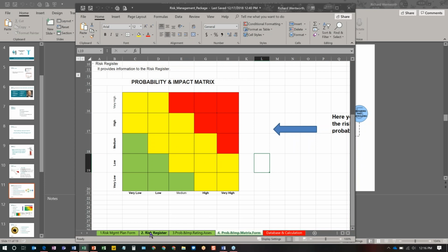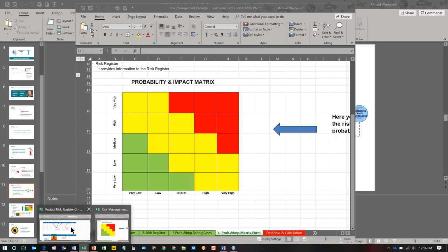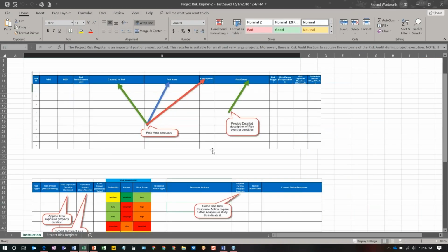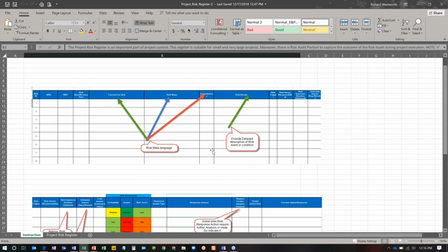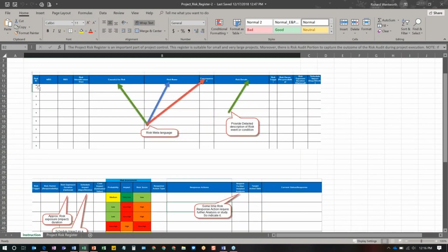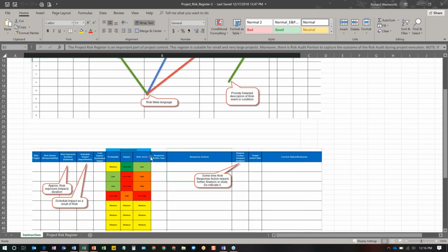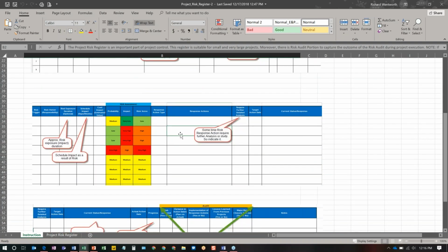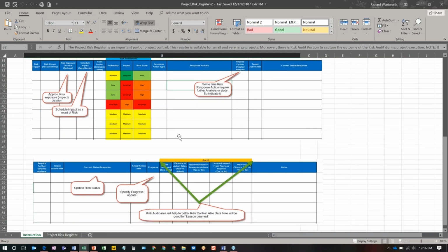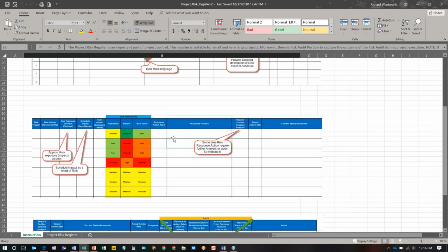And then, while I have this tool up here, there are also risk registers. So if I show you another one, a risk register is another artifact that is used when you're actually logging your risks. You can see this, these are some screenshots of what this looks like. It gives you identifiers, WBS numbers, risk breakdown structure numbers, a whole variety of fields available. You have the ability to show your probability and impact, which can come up with a fundamental score. And this is a massive template that you can break out and use, but it's very useful.